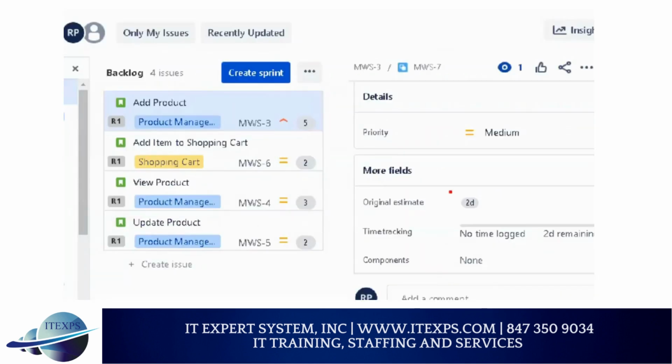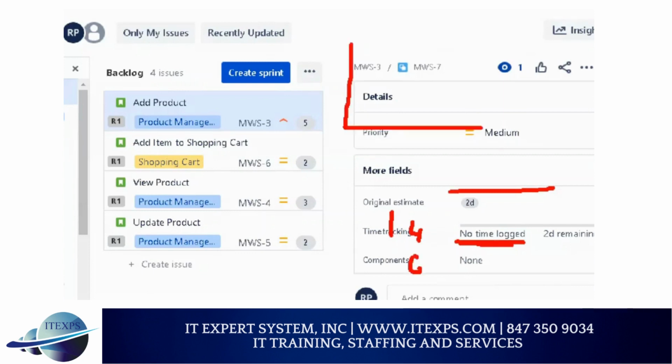So in real life, when you work on that, you will log your hours. For example, one day you work, you can say 4 hours. So you log it. Then you work 6 hours, you log it. When you log it, it will create a burn down chart nicely for you. But 16 hours you write in a sprint planning. But next day when you come and say how many hours you worked on this task, you write it. That way you can understand what was the plan and what is the actual. So this gives you a kind of comparison, plan versus actual.